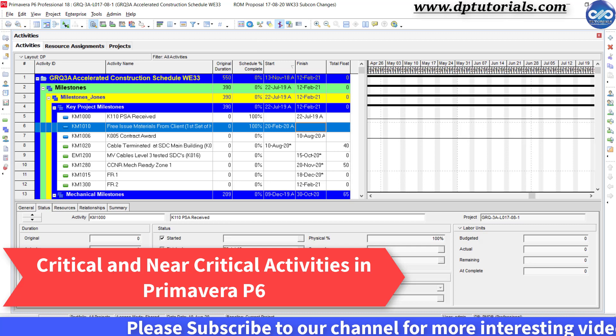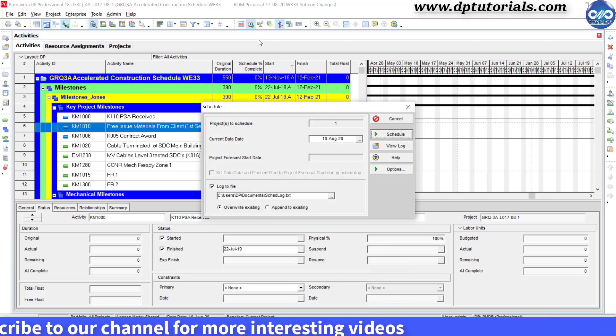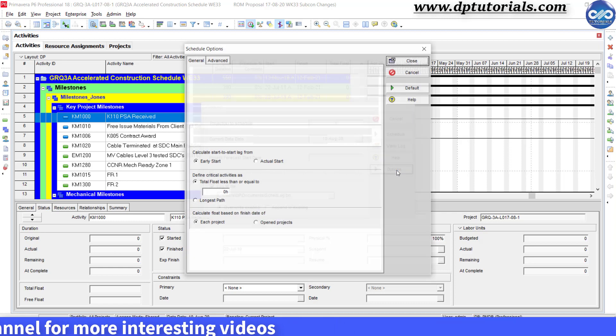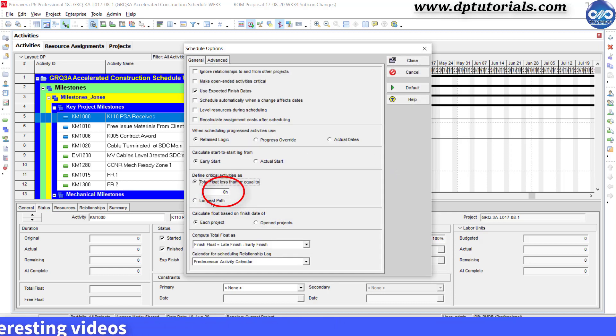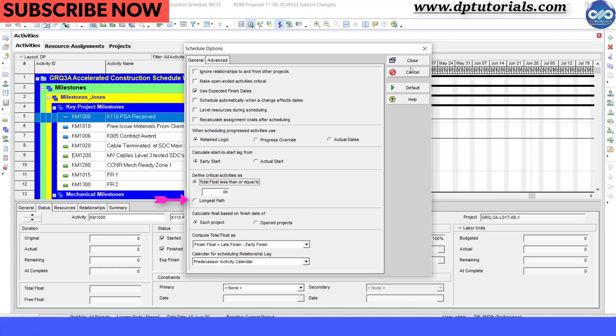You might know that the critical path in Primavera schedule by default contains activities with the total float as zero duration. Of course, another option is that you can select the longest path as a critical path.